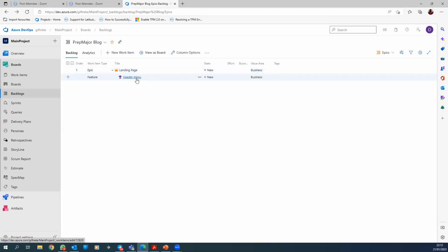Can you remember when I was talking about the definition of ready? I don't even know if it was there I said it, but I mentioned that every story must be tied to an epic. It's good practice. You should not have stragglers, stories that are just on their own. They should all be linked to features and epics. That is industry standard, best practice. So you see that the feature is under the epic.